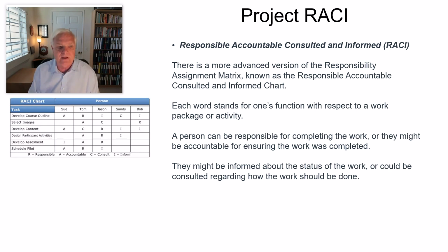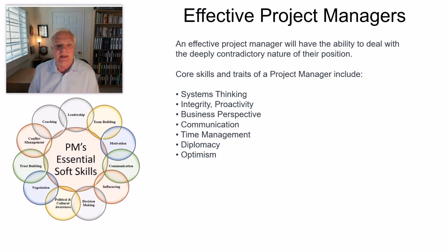Now you can also take this RACI, and the RACI can be, I'll call it resource loaded against your Microsoft Project schedule or a scheduling tool, and you can actually understand the cost of each person for each task, depending on how you blend that and put that together.